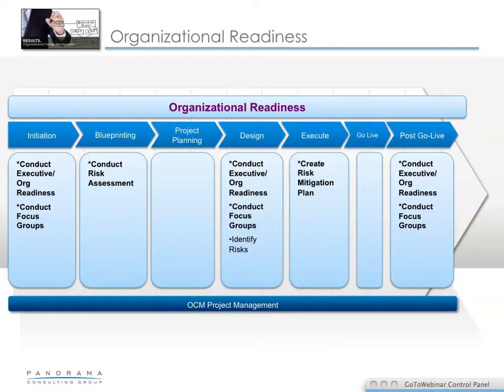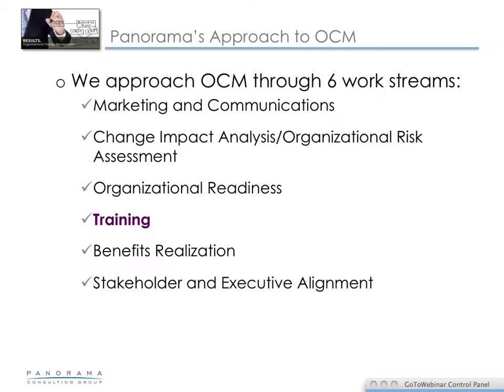We take an original assessment at the beginning to understand the as-is situation. We most often take one just prior to training so that you can understand if individuals are going to be ready for that training. If in fact, we want to understand how much they know about the project so that they are receptive to the training. And then often you'll take one just prior to go live, so you make sure that the organization is ready.